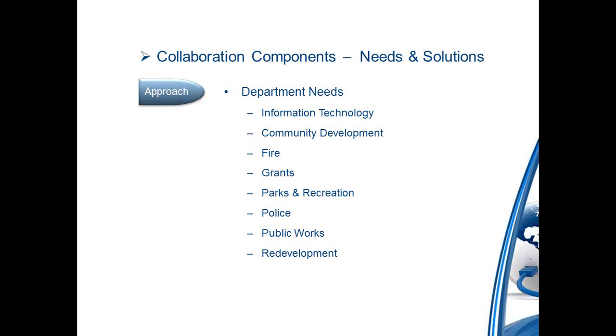We started out by determining how many people we were going to have to talk to. In order to do that, we went to the website and looked for a staff directory, couldn't find one, so we just went through the Public Works Department's section of the website, looked at what the different divisions were, what kind of tasks they handled, and then tried to get an idea of how many people might be working in that division and how many of those people we might actually have to talk to.